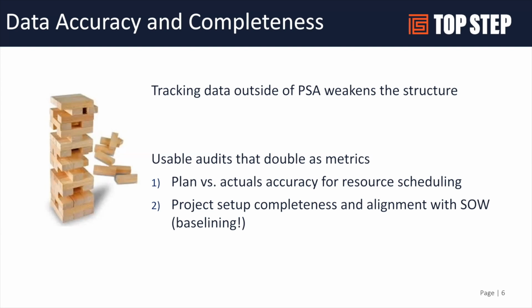And we also generally recommend baselining. So if you're setting those planned hours based on the SOW and then taking a baseline, you always have a place to go and see, okay, if we adjust the planned hours, what is that? How do we do versus what we actually expected to do? That's a great opportunity to learn, to get better at your estimating process, and also understand strengths and weaknesses of your resources, taking expected time or taking too much time to complete certain tasks.